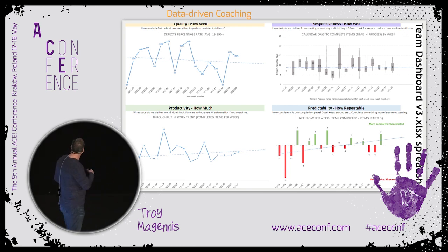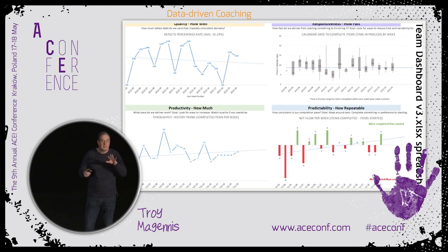I don't really care which one you use, but again, it's all about the trends and it's all about projecting that out to see which direction it's heading. So here, even though the defect ratio is going down, that's not universally good. What it could mean is someone put up a dashboard in the lunchroom which had person and defect name, and now people are hiding defect data. Remember, this is all about the discussion about why it is going down. The team needs to be able to explain that.